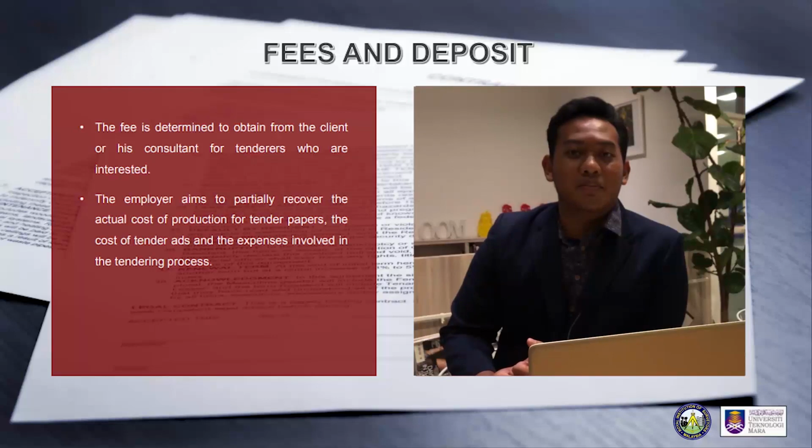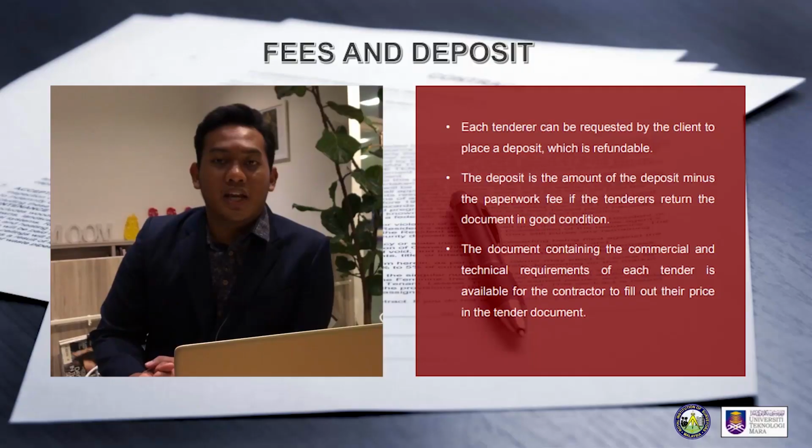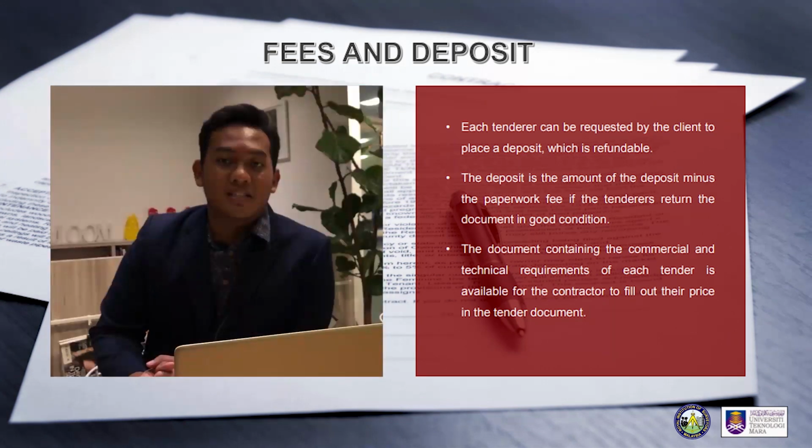The fees are determined by the client or the consultant. They aim to partially recover the cost of production for the tender documents and expenses involved during the tendering process. The deposit can be requested by the client from the tenderers and it is refundable. The deposit acts as a guarantee for the tenderers to make sure that the documents returned will be in good condition.